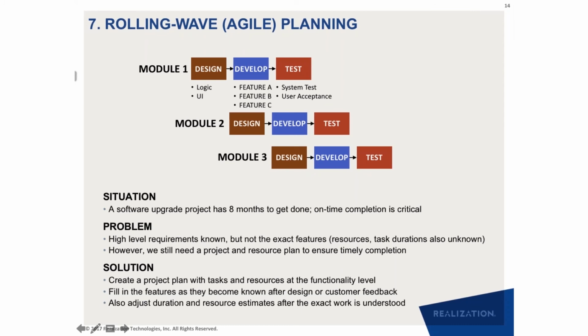If I say I want to design this entire gearbox, which has many moving parts and many analyses that have to happen, I know that I can do that in 2 weeks, without knowing exactly what's going to happen day to day. If I try to think about all the things that could happen, it's not 2 weeks, it's 4 weeks. So it's much easier for people to think, I have to design this feature, I know I can do it in a week. I have to design this hard part, I know I can do it in 4 weeks. I have to tear apart this entire section of the aircraft, I know we can do it in 2 days. In your experience, is engineering design or preparing the engineer the main limiting factor or constraint?